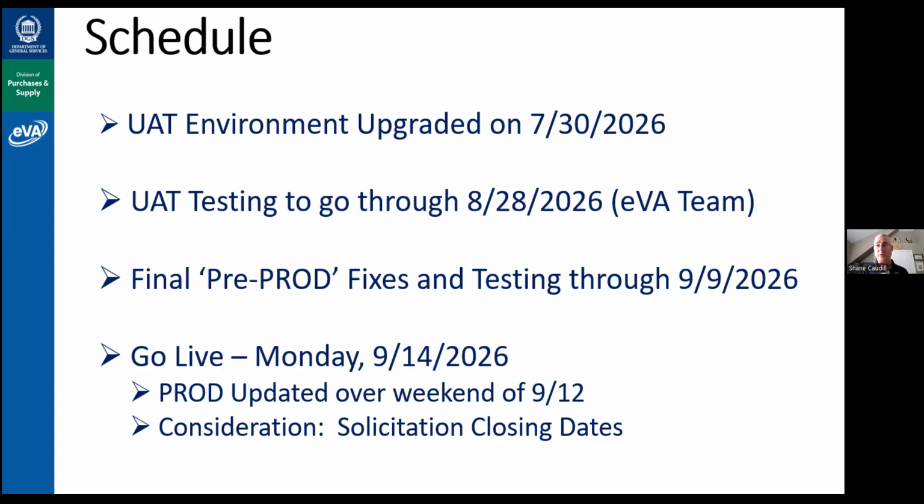And certainly we will query our open solicitations and look for closing dates and make sure we're not impacting, to kind of give a direct warning out to those users so that we're not impacting our solicitation close dates and our ability for our supplier community to respond to those solicitations. So that's just kind of a little look at the schedule.